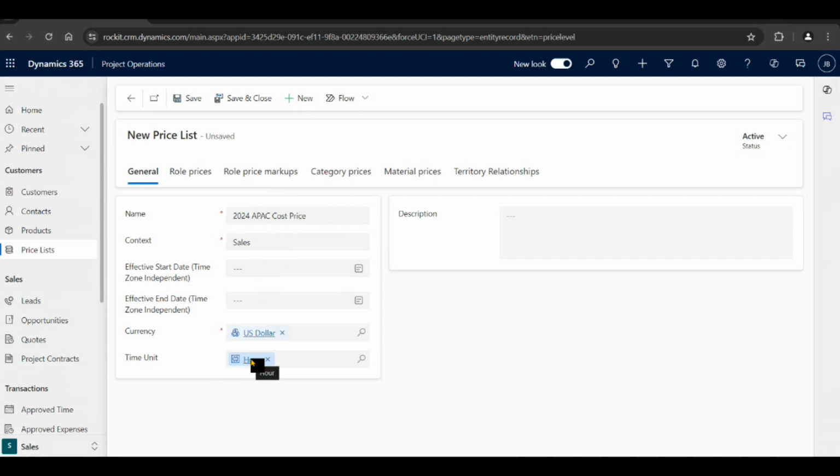Okay, for example, if I am a resource, my organization will charge let's say $300 per hour for my time spent on their project. Okay, but what is the cost? Cost means the expense incurred by my organization to give me salary, and at what rate my organization gets my time for them.